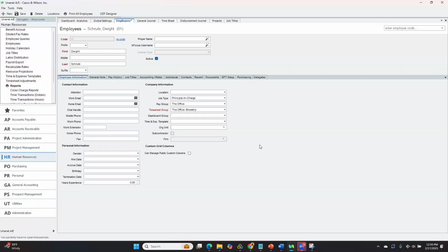Well, let me ask you this. Since we're a bi-monthly employer, if you were to take a salary person's cost, an 80-hour period is going to be higher than if it was 96. So if I look at job cost on a project, it's always going to be calculated based off an annual salary divided by 2,080, instead of varying because of the difference in hours in a pay period.